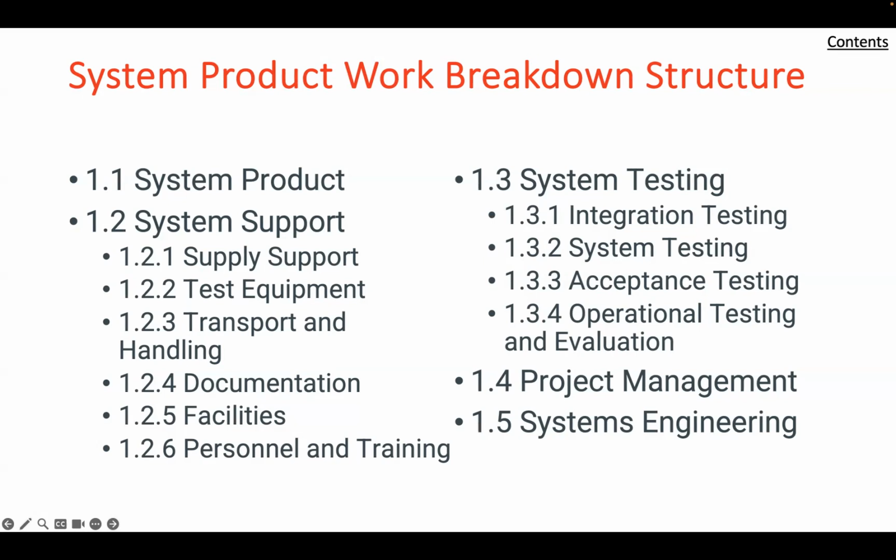The WBS is structured so that every task is identified at the appropriate place within the WBS hierarchy. System engineering plays an important role in helping the project management to structure the WBS so as to achieve this objective. The use of the WBS as a project organizing framework generally begins in the concept exploration phase. In the concept definition phase, the WBS is defined in detail as a basis for organizing, costing, and scheduling. At this point, the subsystems have been defined and their constituent components identified.